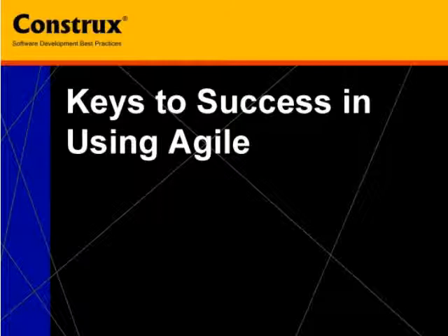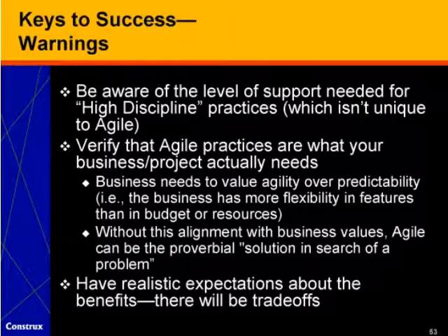First, a few warnings. One warning is be aware that some of the Agile practices are, in fact, high discipline practices, which means if you push the charter for adopting Agile practices down to the level of an individual developer, that may not work, because you actually can benefit, or in many cases you actually need some external accountability, and if you don't have at least a manager involved, that can be problematic.